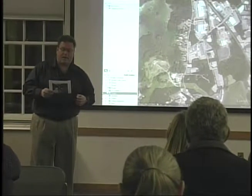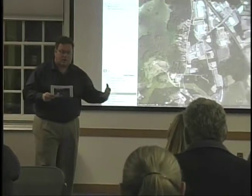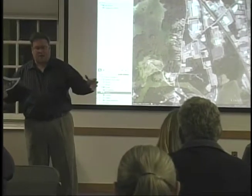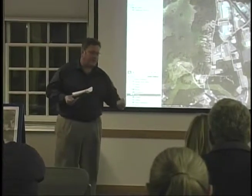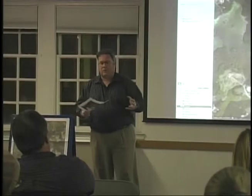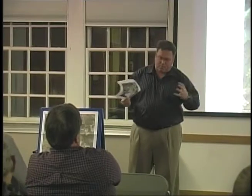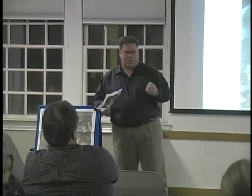So with that being said, at this point, we are midway through what we call the remedial investigation. The purpose of that is to collect all the data, to collect a good defensible data set that we can then feed into a risk assessment and figure out what specific areas need to be addressed. And then from there, we'll start developing cleanup plans. When we propose cleanup plans, this process is pretty much informal until the point where EPA comes out to the community and says, we have a proposed remediation plan. Here's our proposed cleanup plan.